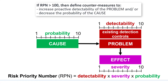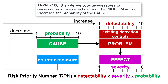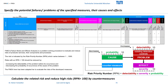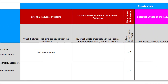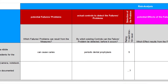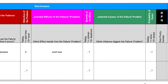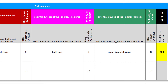If the risk exceeds an upper limit — I recommend RPN greater than 100 — then countermeasures should be defined. Our FMEA is about identifying possible failures or new problems that can result from the implementation of the specified measures. We assume that the extra portion of chocolate can lead to caries for our chef. The actual control to proactively detect this problem is a periodic dental prophylaxis, and we evaluate the detectability of the problem with a moderate value of 5. The potential effect of the problem could be a loss of teeth, and for our young chef we rate the severity of this effect with an 8 — quite high. The direct cause of the problem is bacterial plaque, and the probability of the cause is 10, because bacterial plaque always occurs when we eat chocolate with sugar. By multiplying the detectability of the problem with the severity of the effect and the probability of the cause, a risk priority number RPN equals 400 results. This risk value exceeds the threshold of 100, and thus we need to develop countermeasures.